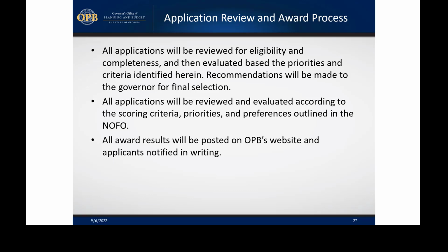But so you would just put the total, put it for engineering fees, et cetera, and show us what your estimate was based on. And then when you bid it out, we know that fluctuation is going to happen. Things may come in at a lower bid or higher, based on where we're at. And you can adjust that with a budget adjustment once you accept the award. We'll also collect a final budget from you. So there's multiple ways to update that budget based on where you're at in the procurement process.